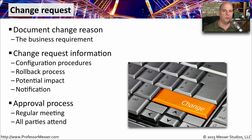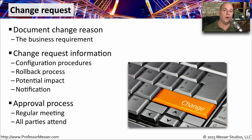Most organizations will do a formal change control process meeting every week. For example, on Thursdays at 11 o'clock, everyone meets and discusses plans for changes occurring over the weekend, two weeks from now, or next month. The exact process and time frames vary by organization, but the important part is that everyone attends. A change to the network can still have impact on the server team, security team, networking team, voice over IP team, and so on.